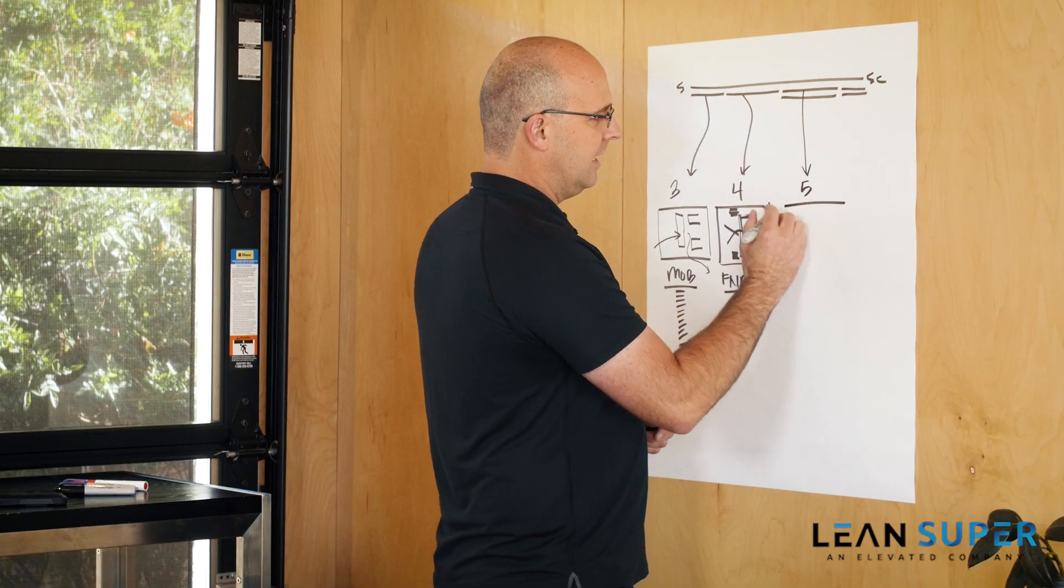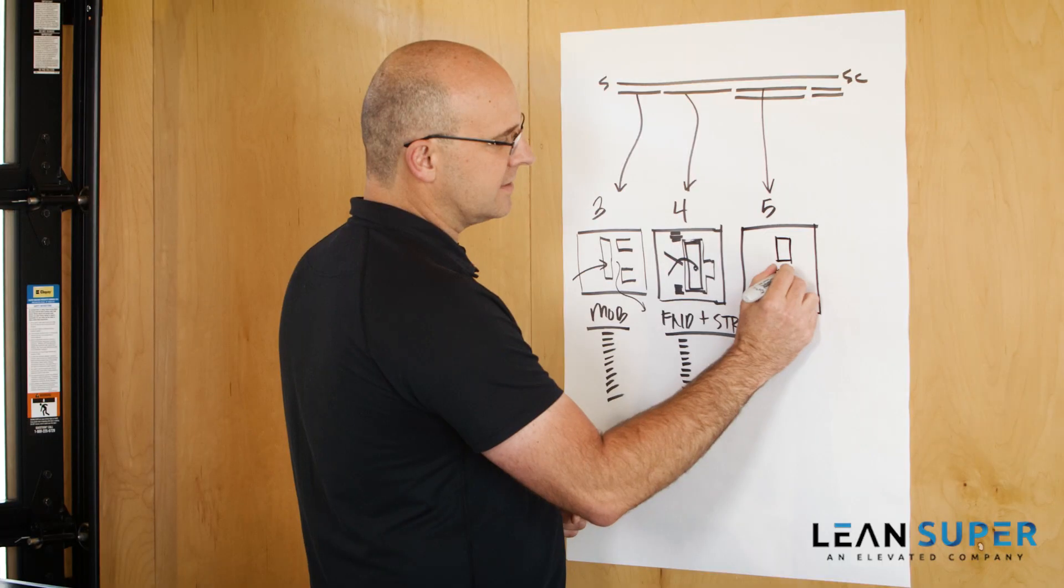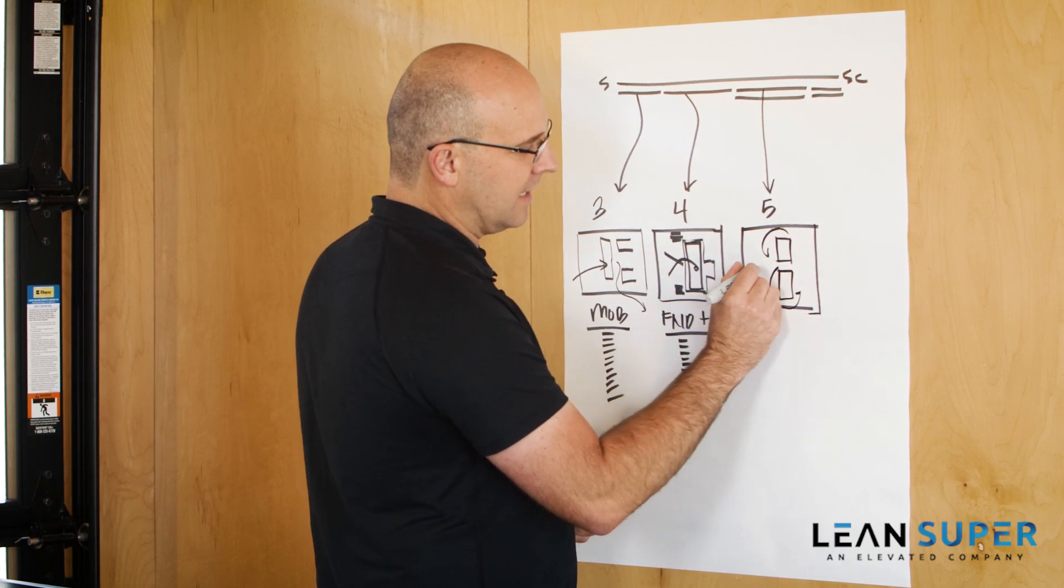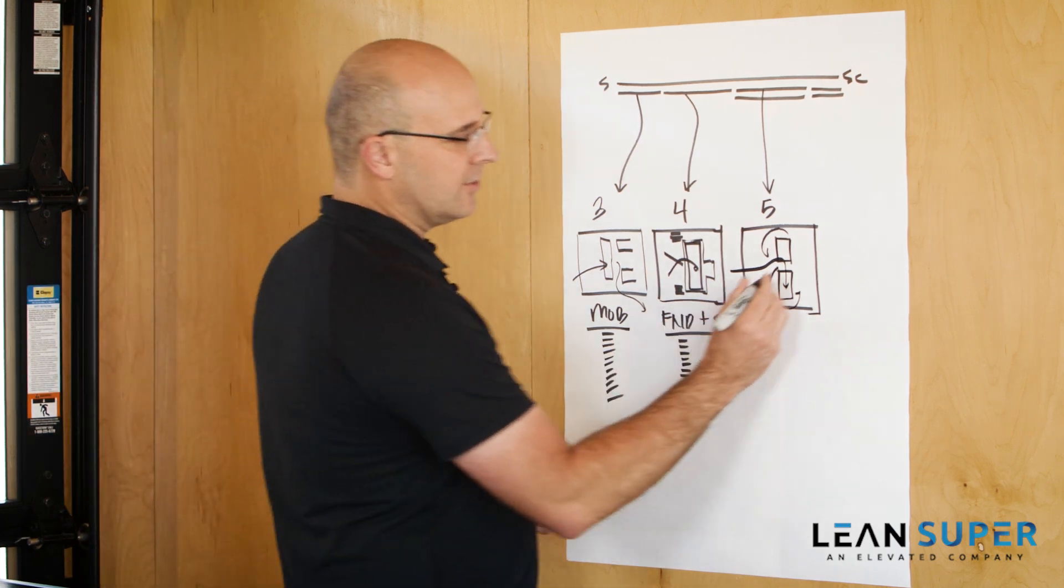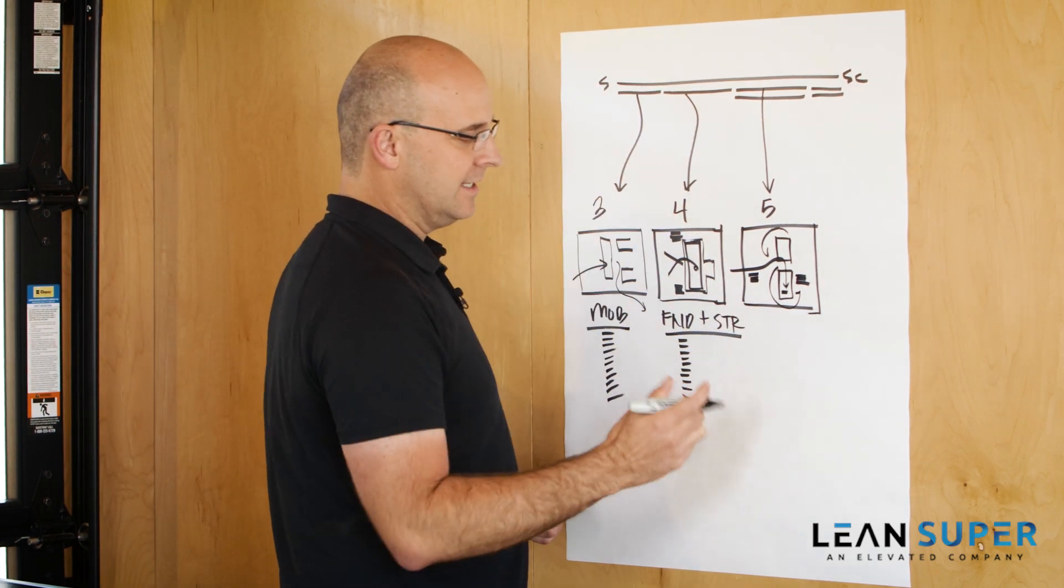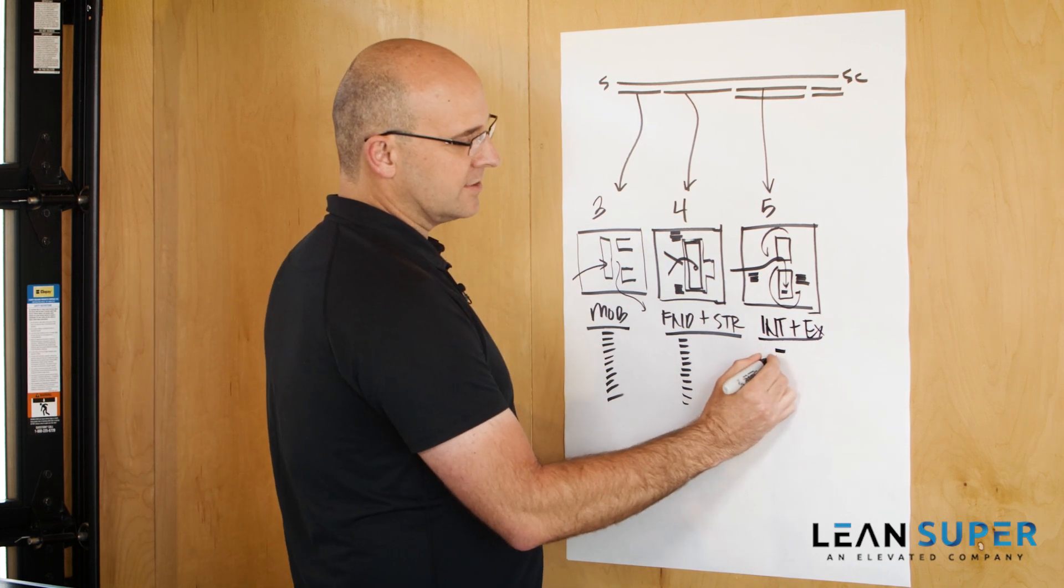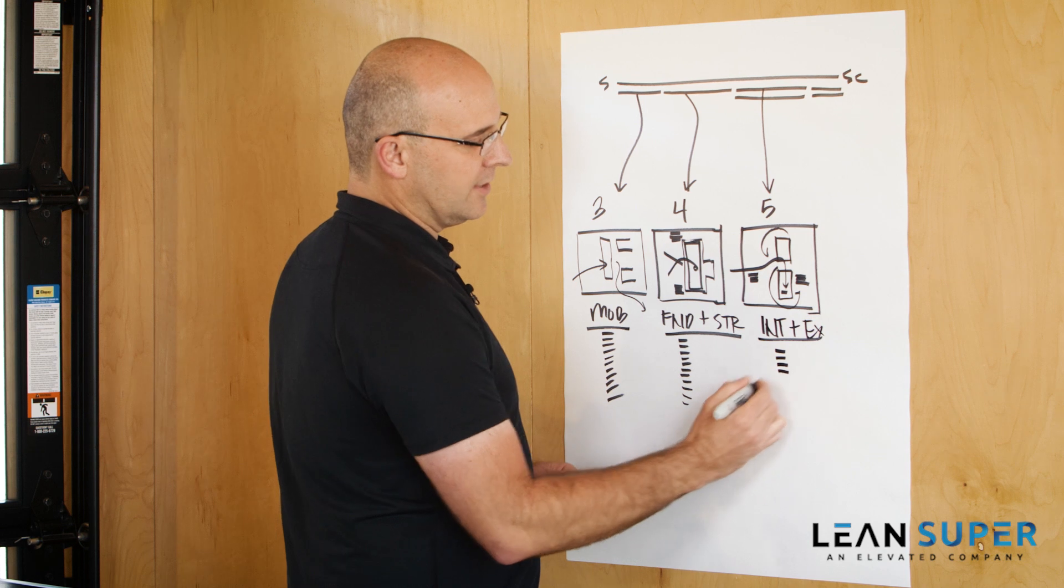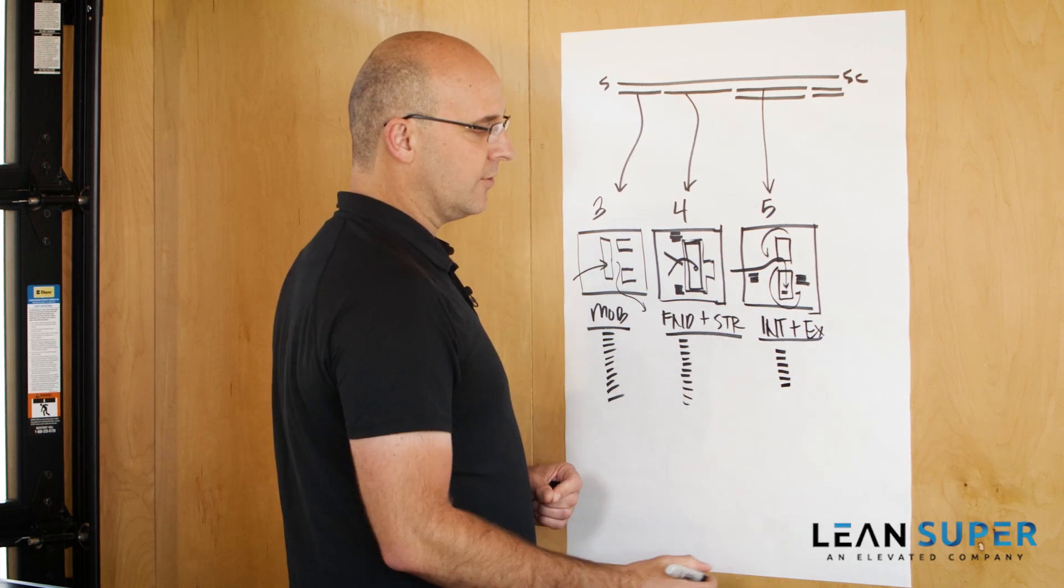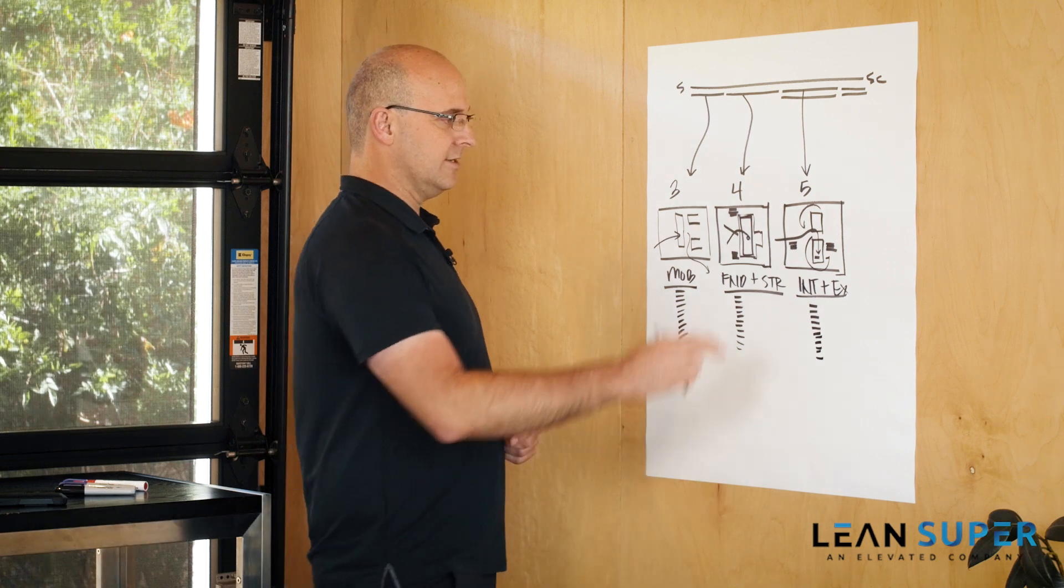Your fifth one is your interior and exterior construction. What I mean by that is if you have a building, there were two wings and we were working the exterior around, but we also needed access into the interiors. So the exterior logistics looks very specific and the interior staging looked very specific for how we were going to get past it and into the building. So when you look at your interior plus exterior, you're going to have things like what's your exterior staging? What's your exterior sequence? Where are you going to lay materials down? How are you going to get access to the outside of the building? How can workers get in and out of the building knowing that you're building the outside? How are you going to mobilize with a hoist or a crane or leave out areas? How are you going to scrap out? All of these considerations are key in this interior and exterior phase and it looks completely different from these others.